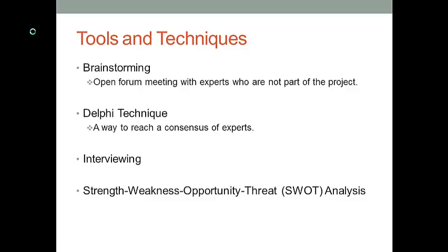You want to keep the meeting and the data collection process going on until all experts reach agreement that all factors being recognized are important risk factors to our project management. This is called the Delphi technique.